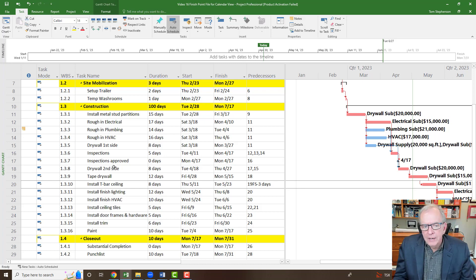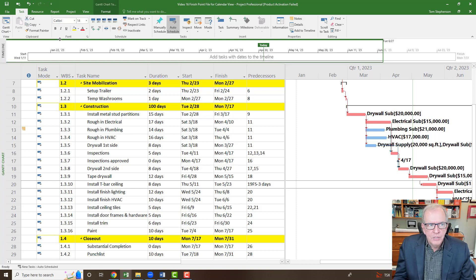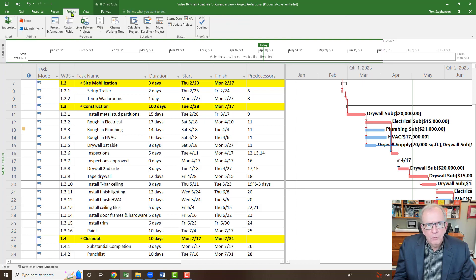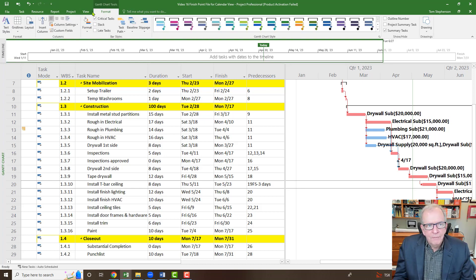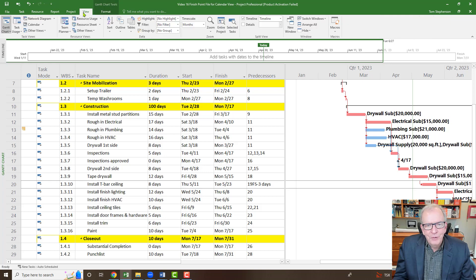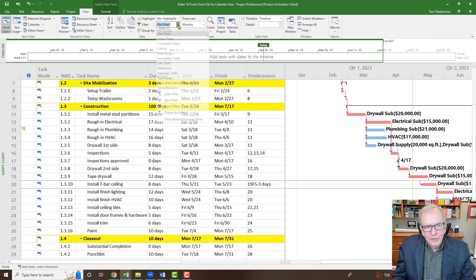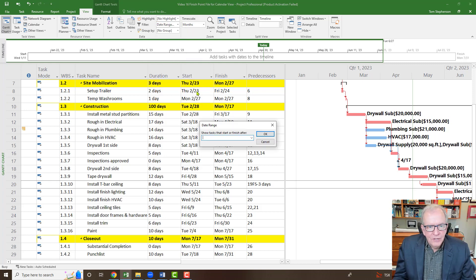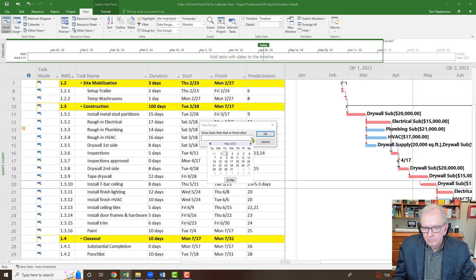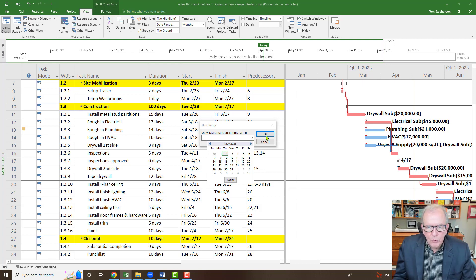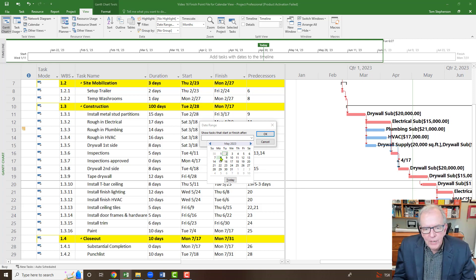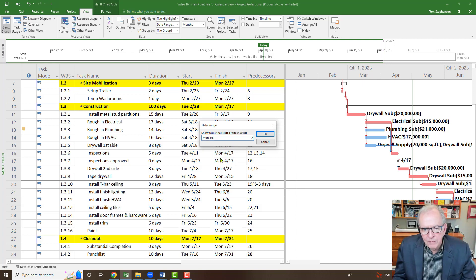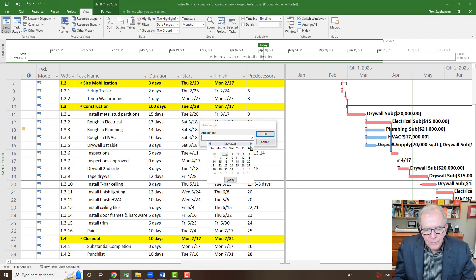In that particular case, we filtered for a number of weeks in a particular date range. We did that by going to the view tab and filtering. So we go to filter and we went to date range, and we filtered based on dates that we wanted to see. We were able to narrow it down to a specific range.